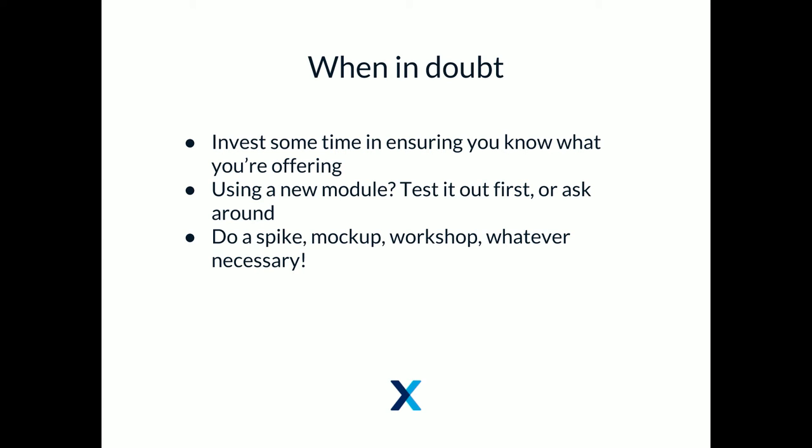And the other thing I'll say is I have one developer who always asks me for a design, and it absolutely drives me crazy, but he's right 9 out of 10 times. We should do not necessarily a fully pixel-perfect design, but some kind of mock-up to say, this is what this page is generally going to look like, and then the client can see it and say, yes, that seems right, or no, just rearrange these things, because it's a lot easier to do that in the design process than after you've implemented it. So encourage your developers to feel totally comfortable suggesting any of this, and if they ask you for it, then let them do it.